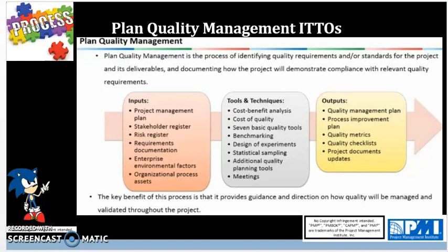Then you have external failure costs found by the customer, which you don't want to happen, which is liabilities, warranties, lost business. So cost of nonconformance is money spent during and after a project because of failures, whereas cost of conformance is money spent during project to avoid failures. Cost of conformance plus cost of nonconformance all fall under cost of quality.